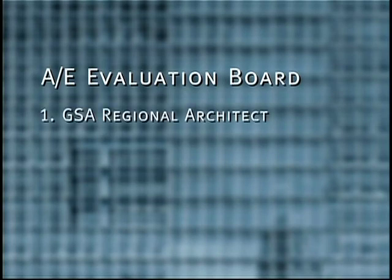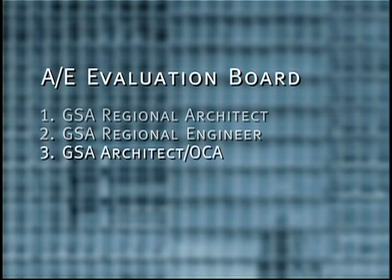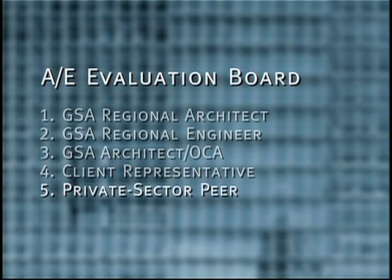The board is composed of 5 individuals. 1, a GSA architect or related design professional from the region in which the project is located. 2, a GSA engineer from the region. 3, a GSA architect selected by the chief architect to represent the Office of the Chief Architect. 4, a representative of the federal client agency. 5, and a private sector design professional.